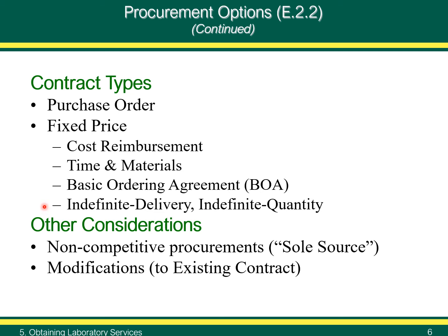Indefinite delivery, indefinite quantity, or IDIQ contract. An IDIQ contract can be used to procure supplies or services. It does not specify a firm quantity that will be issued and delivered during the period of the contract, as do delivery orders or task orders.